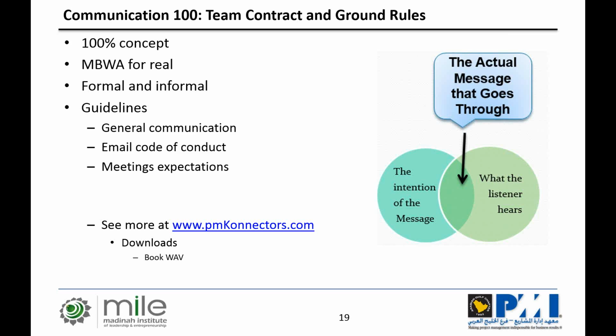Again, formal communications and informal communications. Formal communications are usually covered properly, and project managers will have a table that establishes who generates what message to whom, in what format, at what time, in what style, and with what information. This is all basic. But what we also need is a set of guidelines or ground rules for informal communications. Again, my company specializes in these things. What we do is go to organizations and tell them, look, if you want to achieve more effective communications, this is what we have to do.